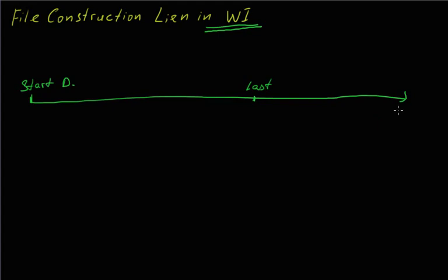In Wisconsin, you can file a lien anytime within 6 months from the last day on the project, or when labor and material were delivered. So, 6 months. 30 days before that, or 5 months, and no later than that, you need to properly serve the owner of the property with the notice of intent.